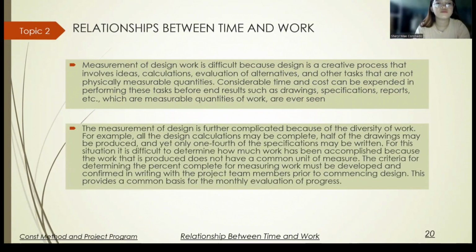The measurement of design is further complicated because of the diversity of work. For example, all of the design calculations may be complete, half of the drawings may be produced, and yet only one-fourth of the specifications may be written. For this situation, it is difficult to determine how much work has been accomplished because the work that is produced does not have a common unit of measure.